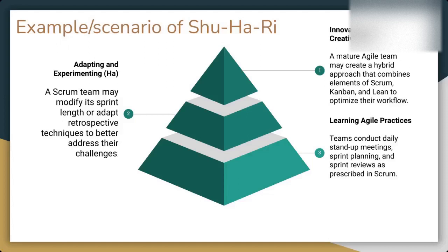Take an example there, right? Like, let's say this team is finding this 2 week long sprint as too long. So instead of doing the sprint for 2 weeks, this team can very well decide to do the sprint only for 1 week. Now this is an experiment, right? This experiment of changing the sprint length may or may not be as per the Scrum guide, but the point here is the team understands that they can, and now they should, tailor the sprint duration depending on the needs of the project. And there is no need to strictly follow the Scrum guide as is, if that doesn't make sense for this team's requirement.